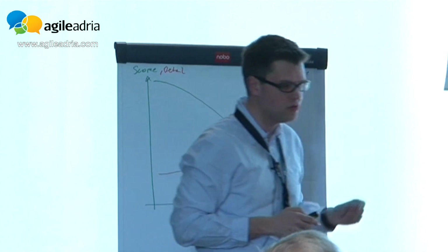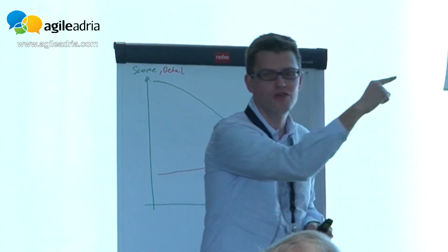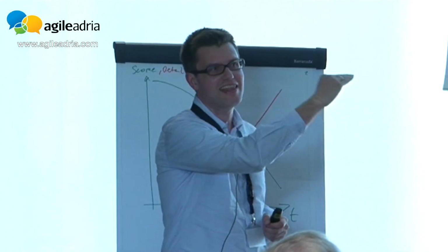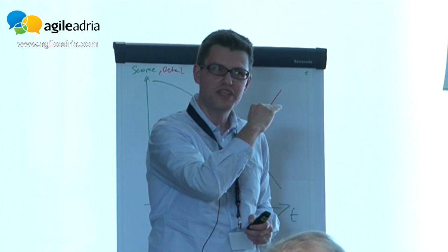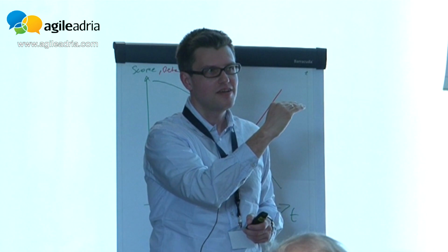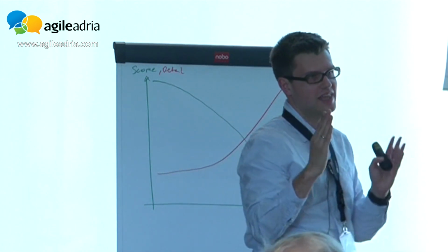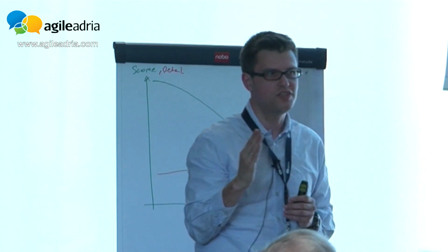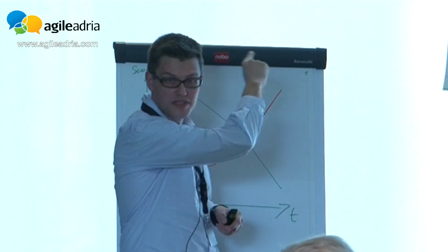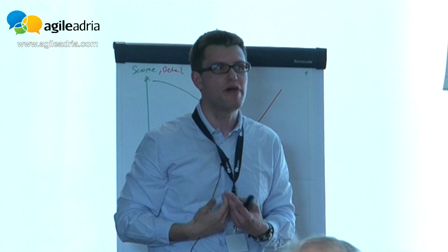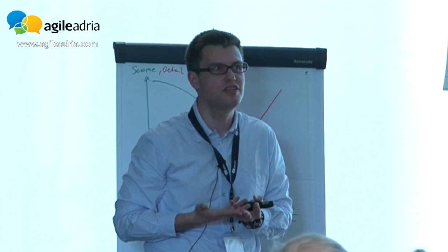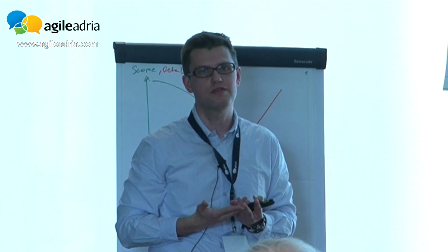The second thing you can do is, this is how you can keep any deadline you want to keep. Because I'm not fixing the scope. I'm fixing the deadline, I'm fixing probably the budget, and I have this map which helps me spend the budget in the best way I can imagine in order to support the process.